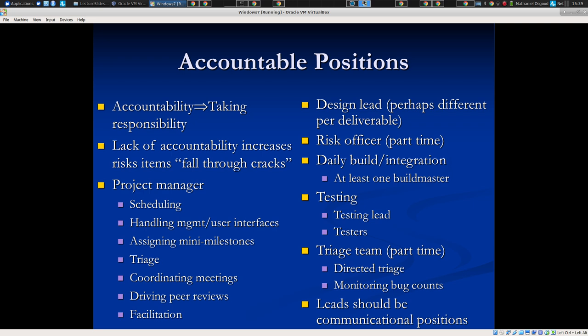I will note there's a risk officer. Risk officers are very important. They're looking for new risks coming about and materialization of risks that were identified earlier. So at the beginning of your project, I ask you to identify top risks for your teams. Give me a couple risks that might apply for 371 teams, across the board. You don't have to be technology specific. What are some risks that might apply to virtually all teams?